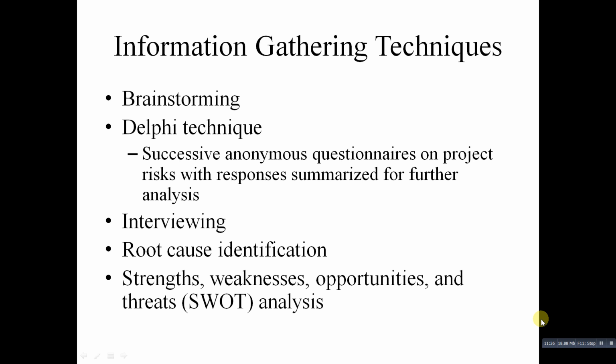Another technique is SWOT analysis of strengths, weaknesses, opportunities and threats, which is often used in strategic planning. SWOT analysis can also be used during risk identification by having project teams focus on the broad perspectives of potential risk for particular projects.